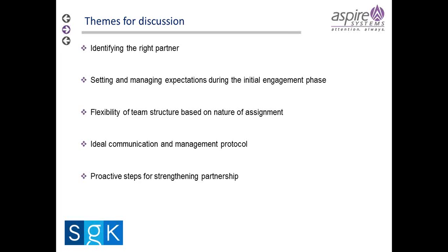As we said a little earlier, the ISV, particularly if it's young, is going to be very profit motivated and cost sensitive. So when you're cost sensitive, you probably want as high an offshore ratio as you can get to keep your labor costs lower. Somebody managing a startup's software company, kind of like we have buried within SGK, might want 90 offshore and 10 onshore, right? Whereas the enterprise model, maybe it's a little more stable, like I said, maybe a longer project horizon, probably going more back to that 80-20.